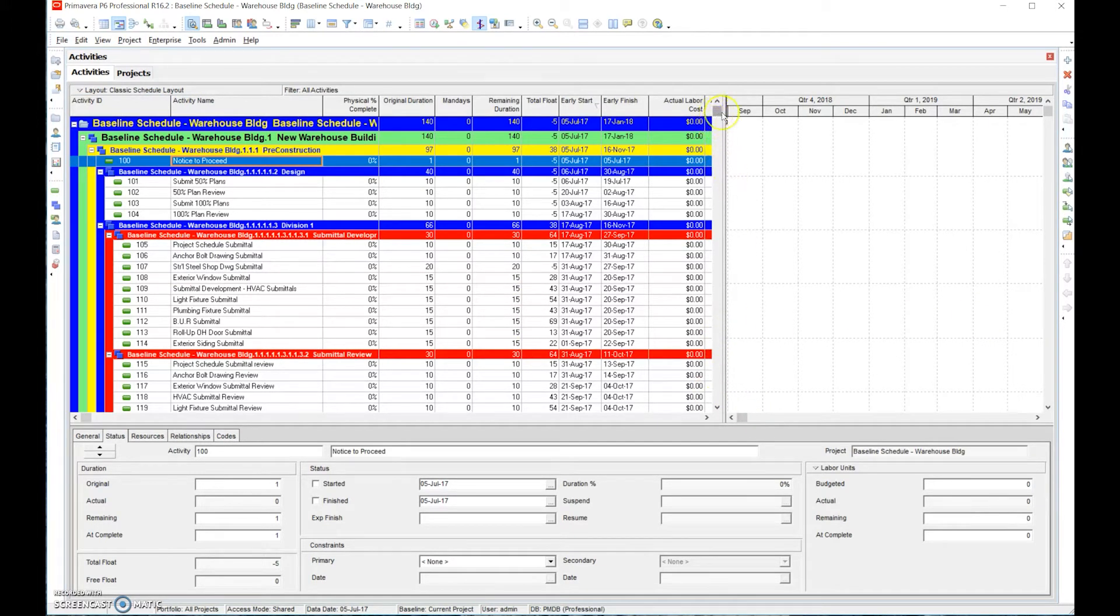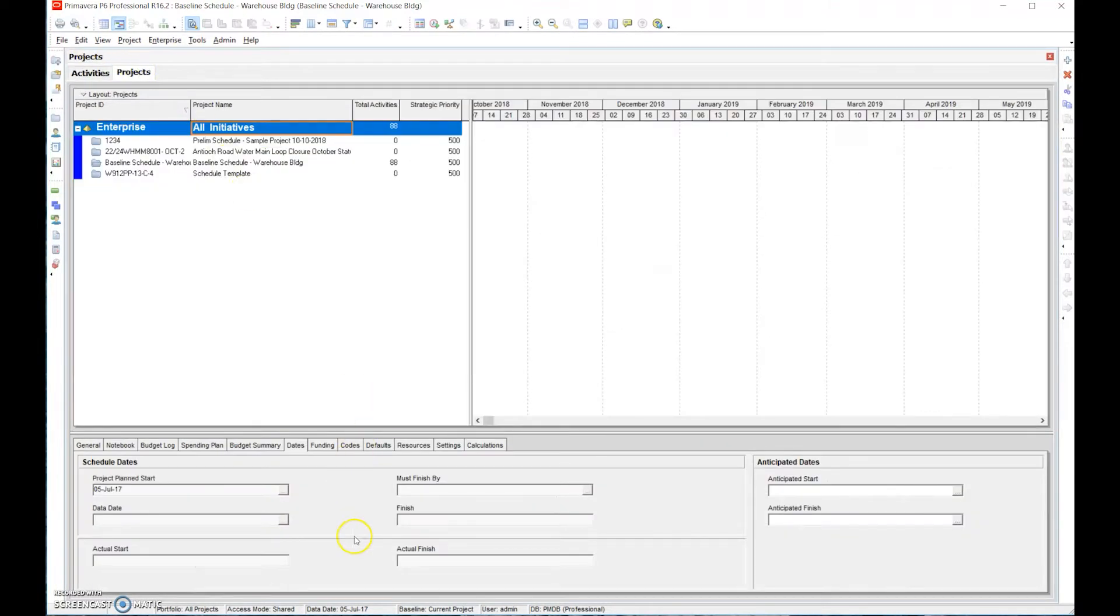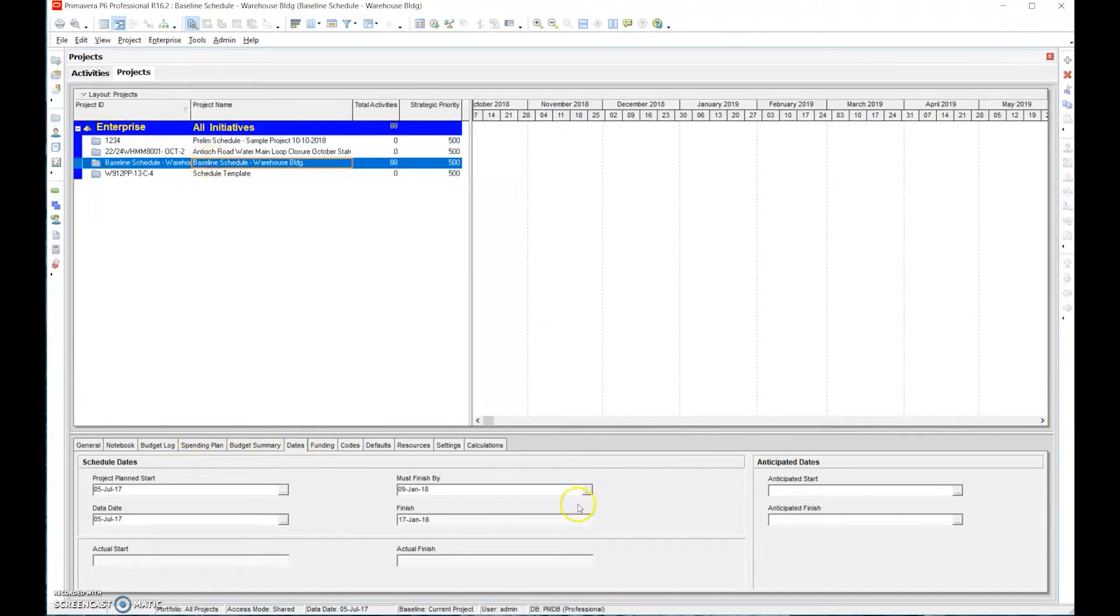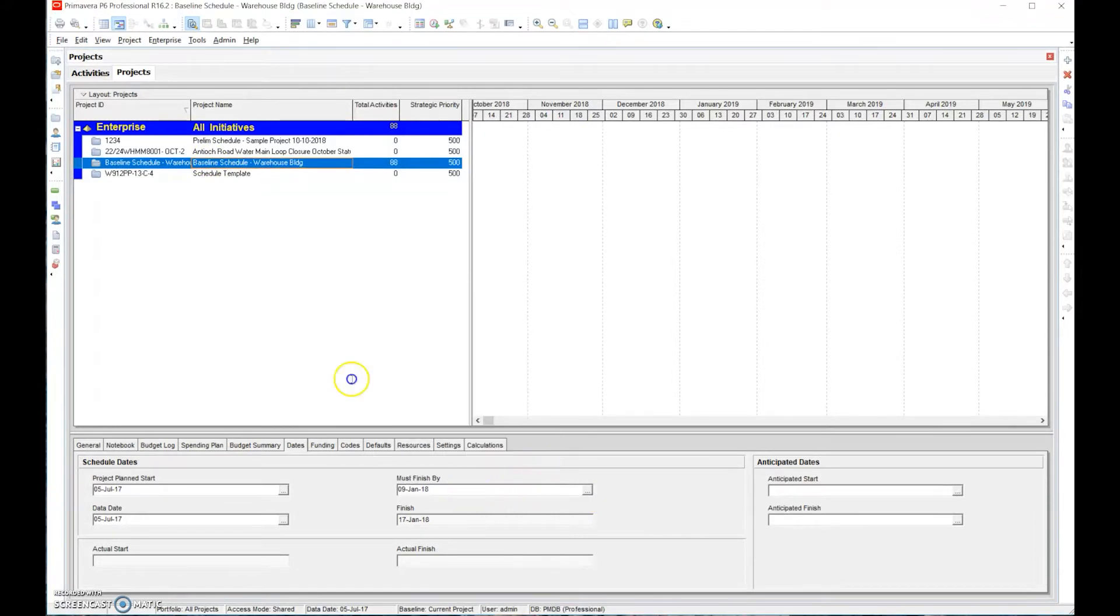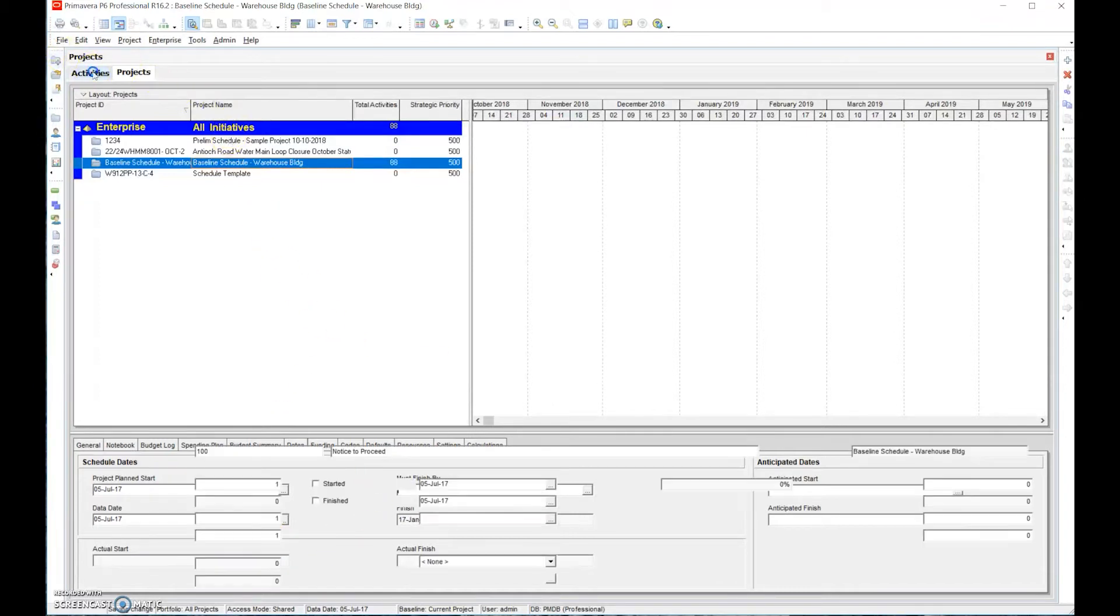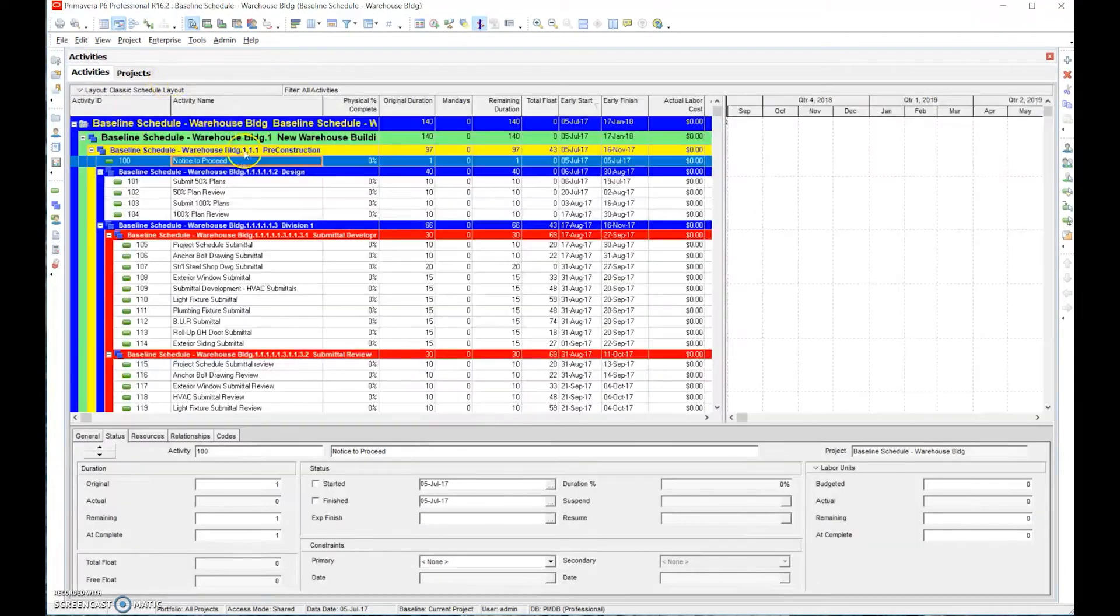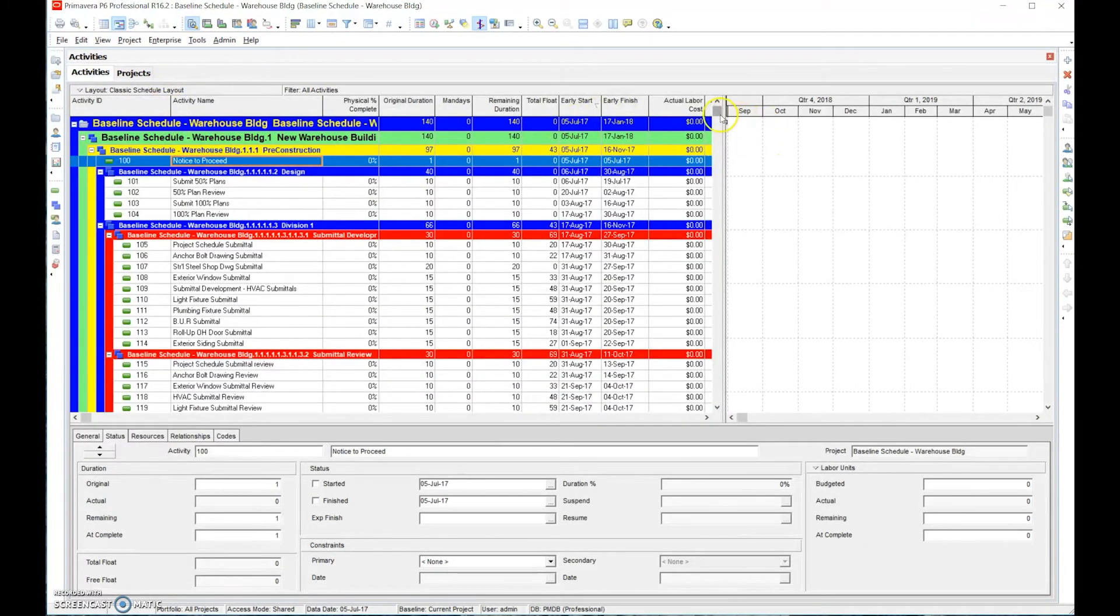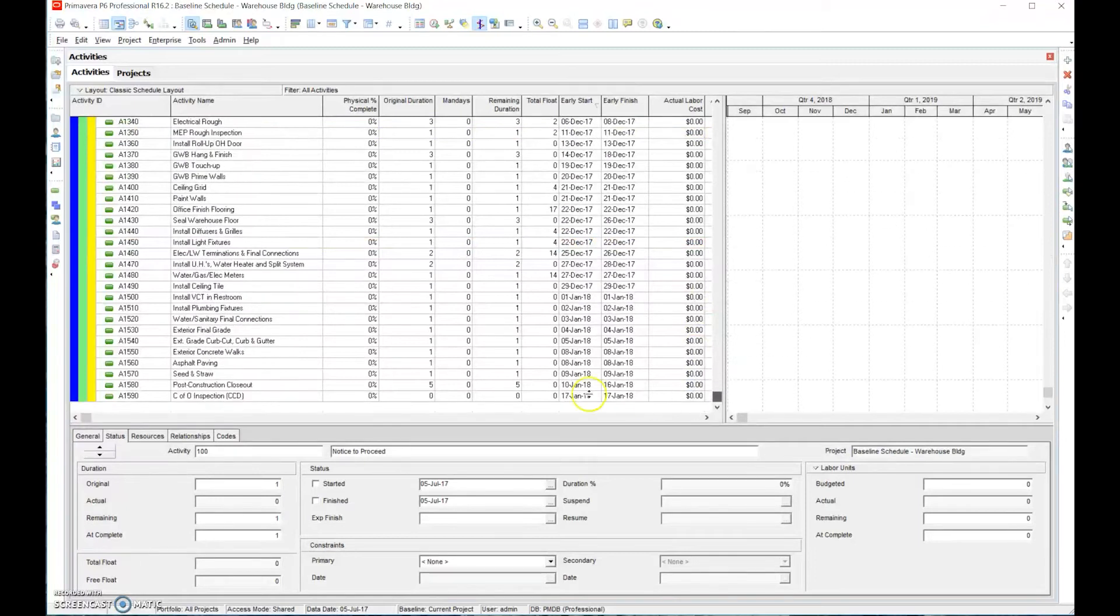A constraint is simply defined as something that holds it, stops it from being naturally pushed by the schedule. So if we have negative five days, that means we're five days beyond completion. Let's go back to the project and look at the float real quick and look at the dates to see if it has any plan finish date. And it does actually. So we want to actually leave this blank, right? And by leaving that blank, that negative number should be taken away. And it was, you can see the negative numbers taken away.